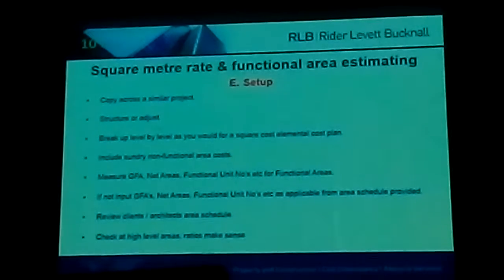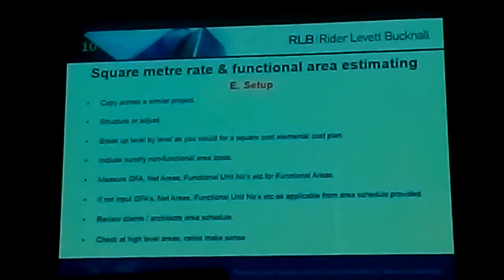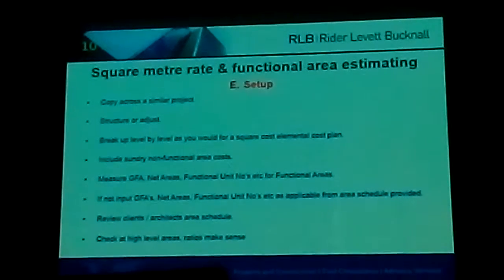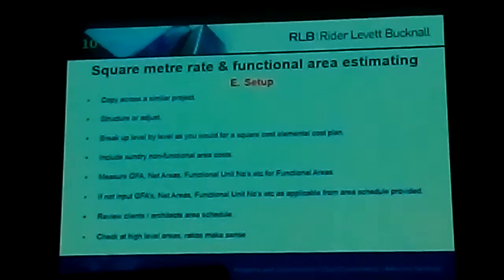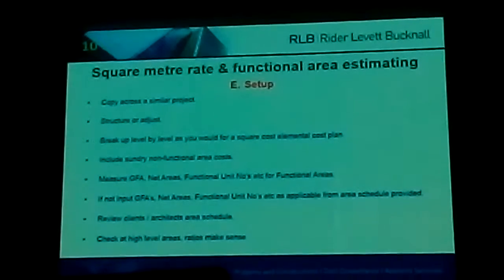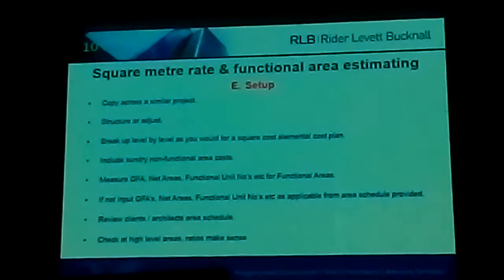Then measure GFA, net areas, functional unit numbers, etc. for the different functional areas, if the documentation permits. If not, input GFAs, net areas, unit numbers, etc. as applicable from the area schedule provided. Then review clients or the architect's area schedule and reconcile with the RLB measure.